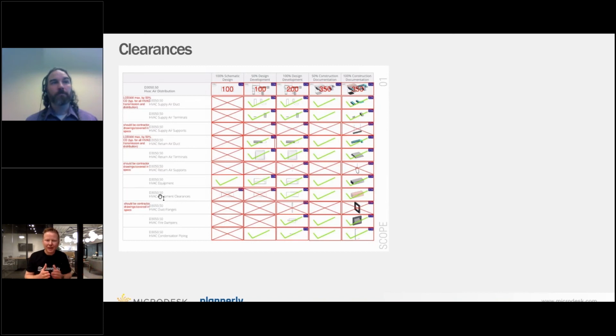And if you can filter, we've got a couple of examples where you just print, okay, this is the plumbing scope for the 2 milestones that they're involved in, and it's a couple of pages, and do you agree with that? They're suddenly so much more bought in, they understand, they'll deliver. It's not confusing. It's not hidden inside of a huge stack of paper. So that's a really important part. I agree.